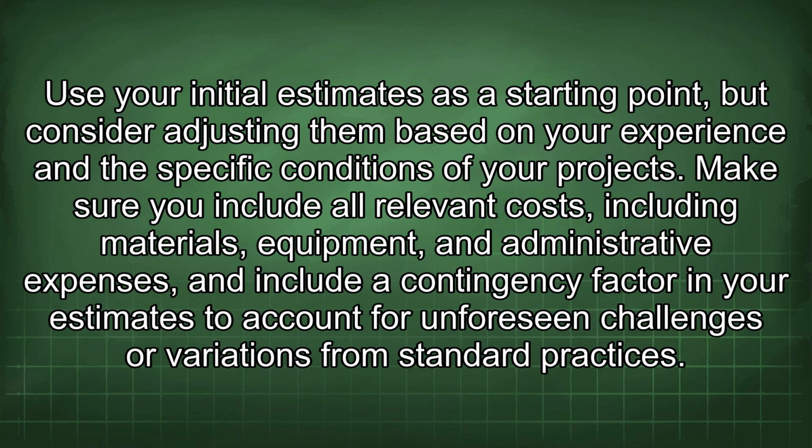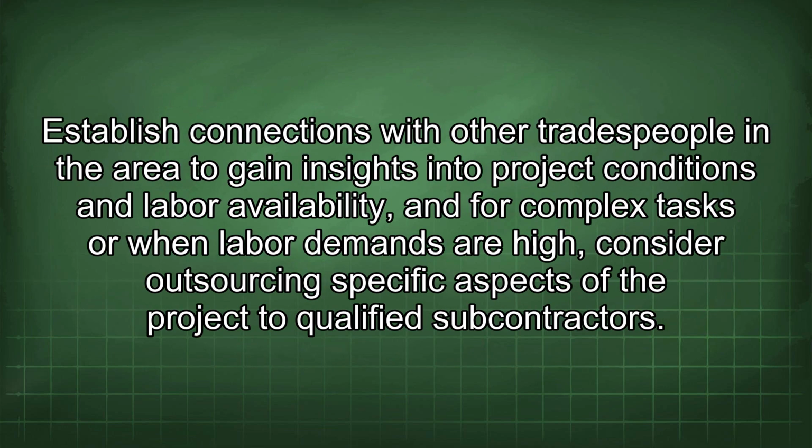Use your initial estimates as a starting point, but consider adjusting them based on your experience and the specific conditions of your projects. Make sure you include all relevant costs, including materials, equipment, and administrative expenses, and include a contingency factor in your estimates to account for unforeseen challenges or variations from standard practices. Establish connections with other tradespeople in the area to gain insights into project conditions and labor availability, and for complex tasks or when labor demands are high, consider outsourcing specific aspects of the project to qualified subcontractors.